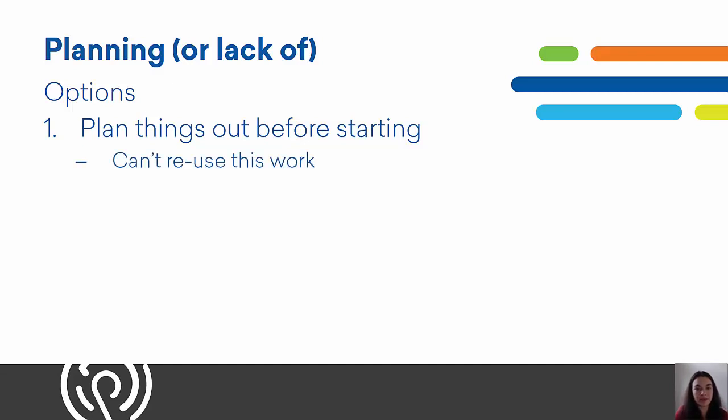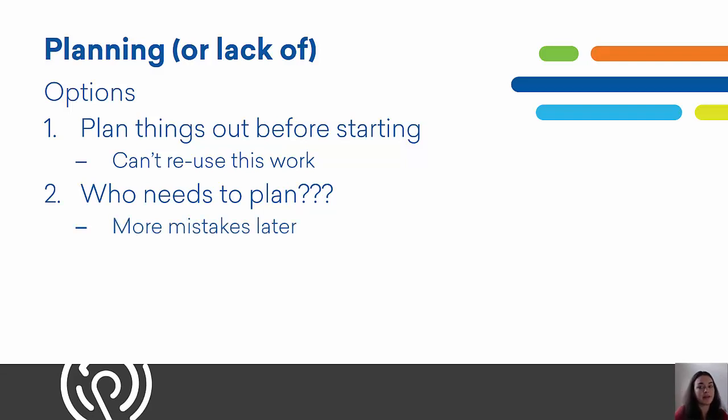Problem with this is that it is potentially wasted time. We can't really reuse this work, right? So the temptation is to skip the planning phase and go straight to drawing the schematics. Of course, we might end up redoing more work with this method because we missed something that we could have seen if we planned things out. Also, we might end up having to go back and create high-level diagrams at some point anyway because we're trying to communicate with a management team or a mechanical engineering team, and they don't read or understand schematics. So again, we're wasting time.